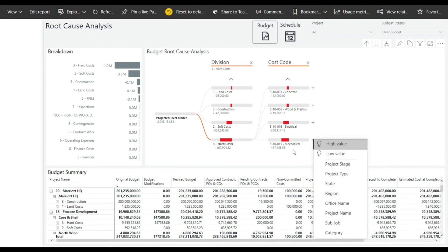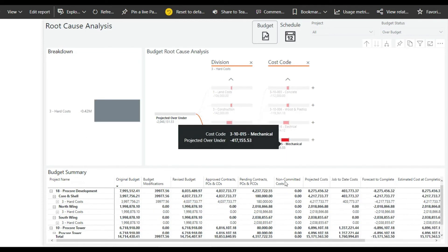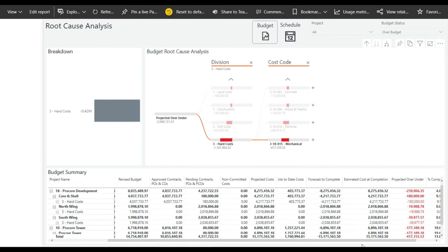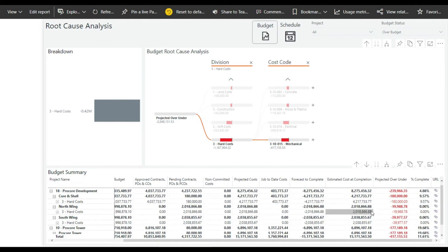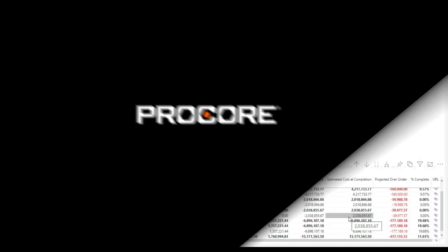The owner can also select any item in the chart and filter down to the underlying data to understand the details. This type of analysis will quickly guide the user to understand root causes of budget overruns, take action, and plan accordingly in the future.